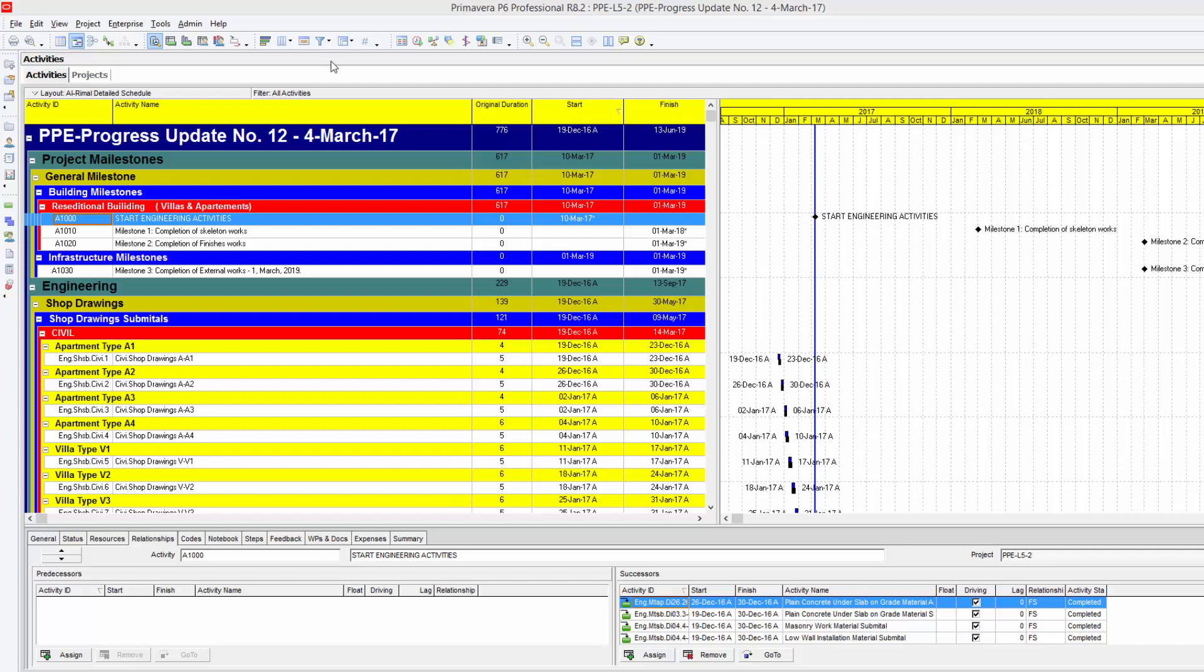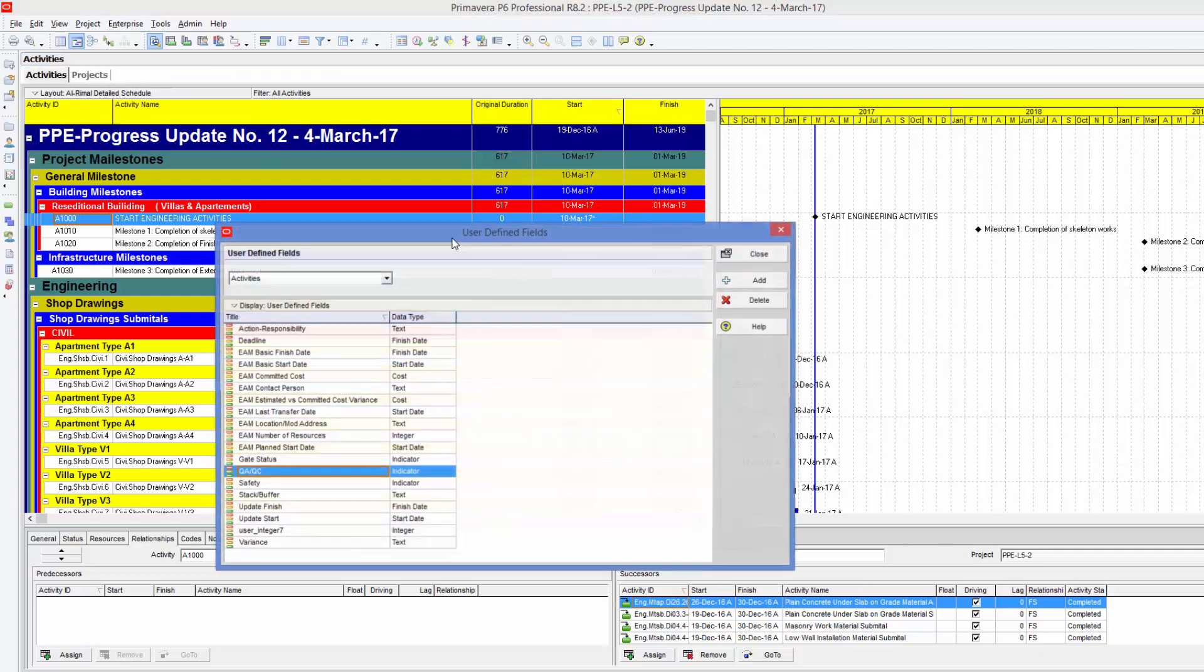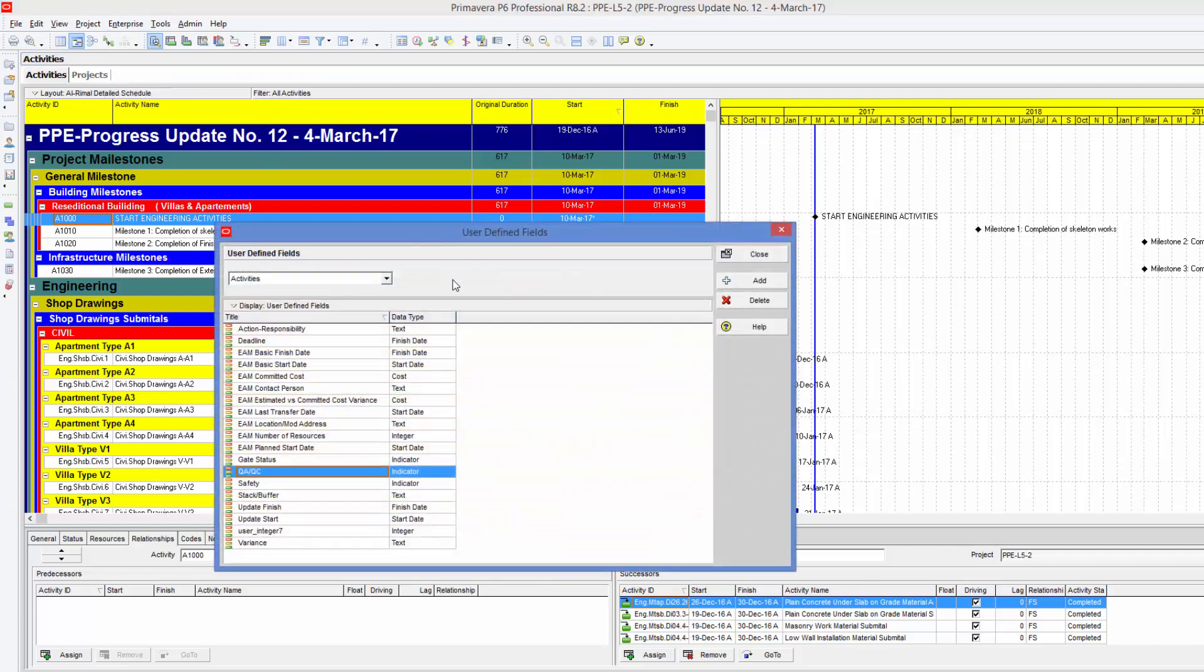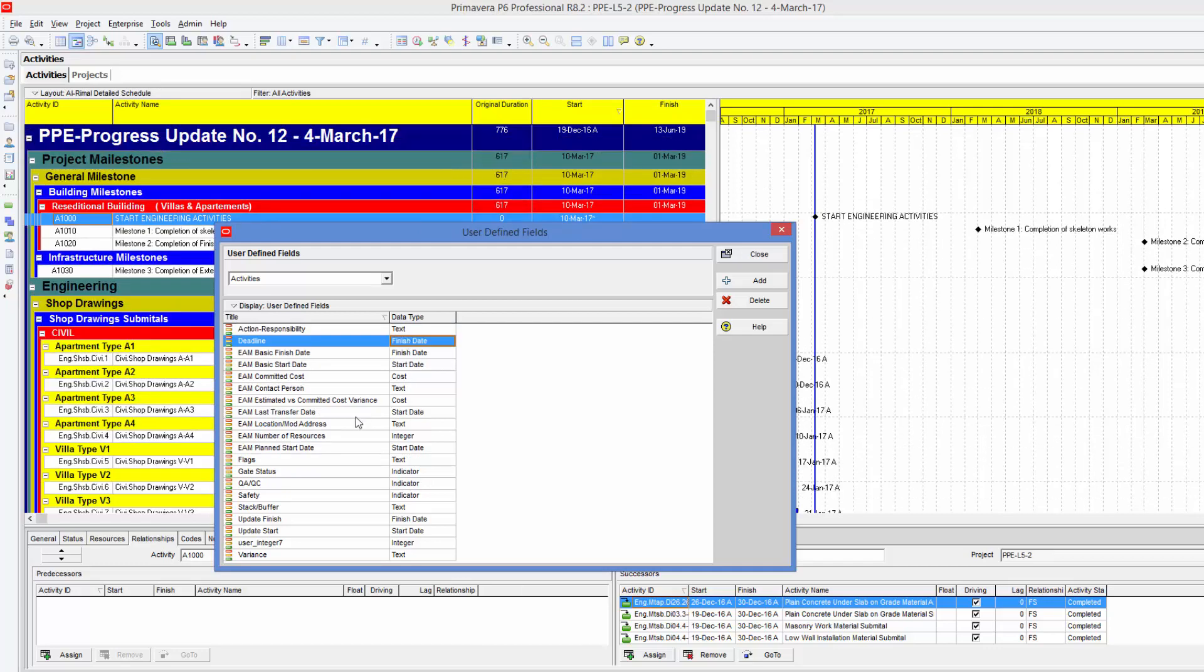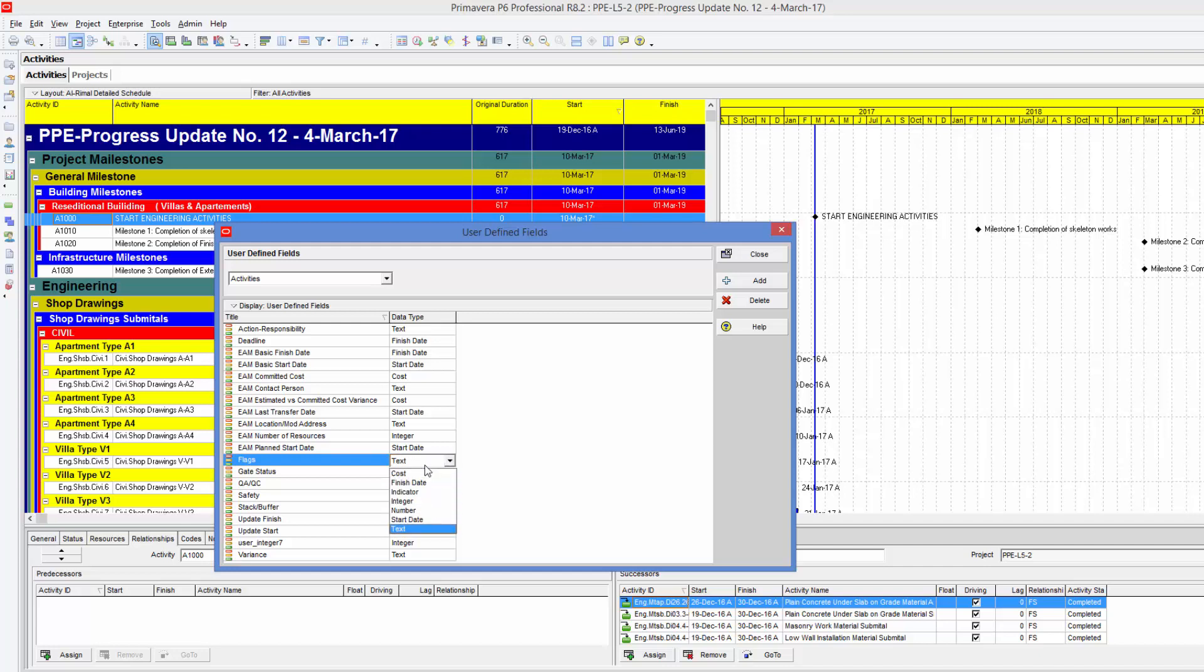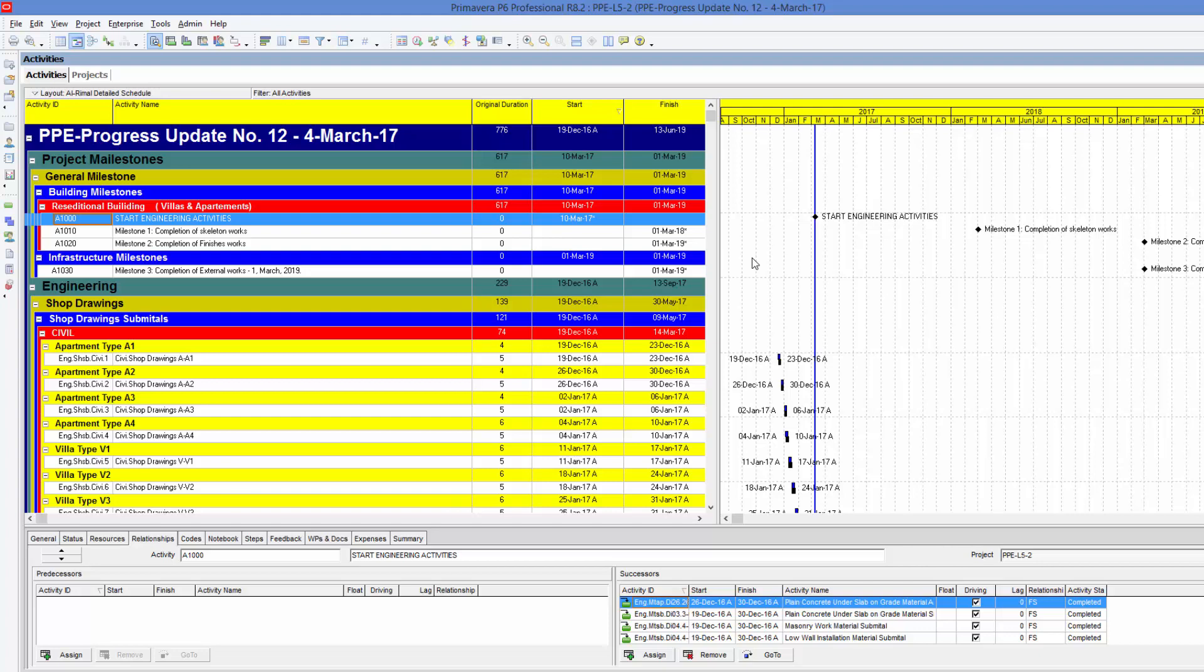First of all, we are going to the enterprise and user-defined fields. We are going to create a new field and we'll name it like flags. Of course, you can name the field whatever you want. But here, the important thing is the data type. We need to put the data type not as text. We need it to be as indicator. So here, we are going to change the text type to indicator. And that's it. We are going to close this window. And now we have created a new custom column in our database that we can use later on.